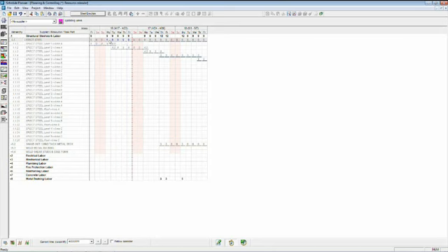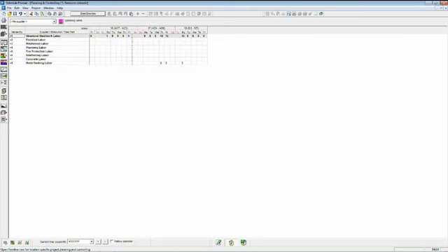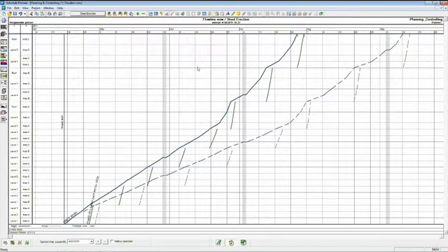When in fact that could be caused by the fact that the steel installer is showing up with 7 men instead of 9. And so that could also be causing the delay in the forecast, but the production rate could be correct. So these are all factors that you need to consider.